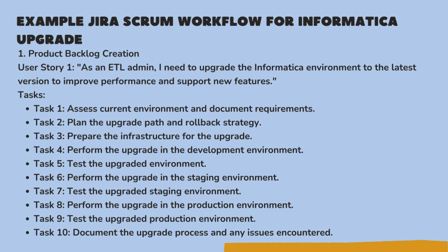Backlog creation. User story 1. As an ETL admin, I need to upgrade the Informatica environment to the latest version to improve performance and support new features. The tasks would include the following: assess current environment and documentation requirement, plan the upgrade path and rollback strategy, prepare the infrastructure for the upgrade, perform the upgrade in the development environment, test the upgraded environment, perform the upgrade in the staging environment, test the upgraded staging environment,